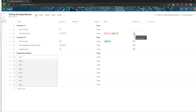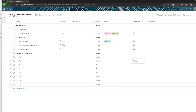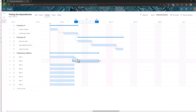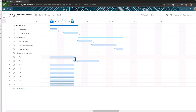There are a total of four types of dependencies. The default is just adding a number — if I click enter now, it will change that to a nine FS, telling everyone this is a finish to start dependency. Microsoft Project doesn't show you that finish to start label, but it is the default. In the timeline view, we see that nice line going into task two, telling us that there is a dependency — this task needs to finish before this one starts.